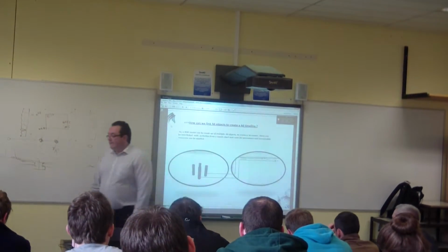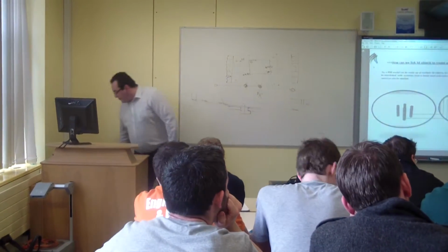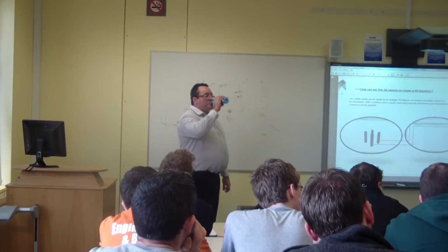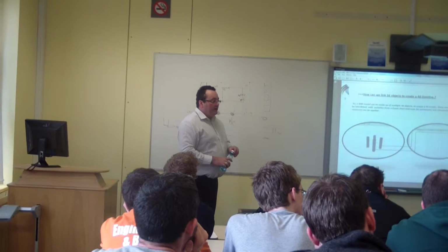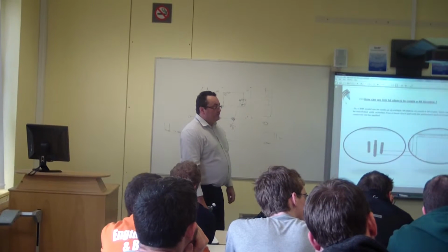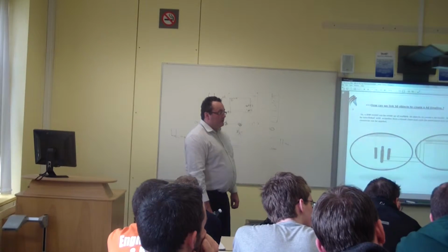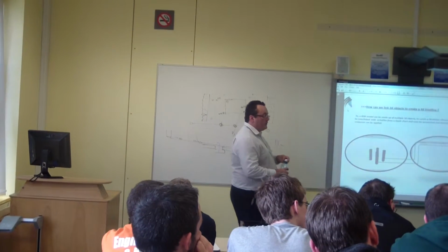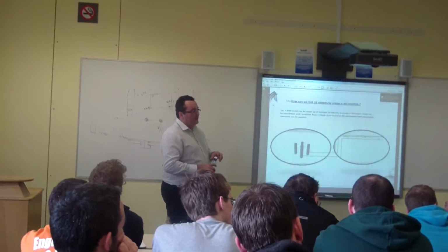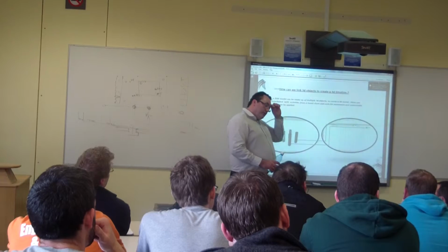In the baseline program, if you've got a delay, as you said, that the rebar schedule wasn't given in time for the next operation to start, does the 5D program, the costing program, only identify and include the time-related costs of that activity, rather than a non-existent extension to the actual concrete, formwork and reinforcement, because it's the same concrete, same formwork and reinforcement, but it's only the time-related costs that truly get extended as a result of the delay? Does that do that? That does that as well.